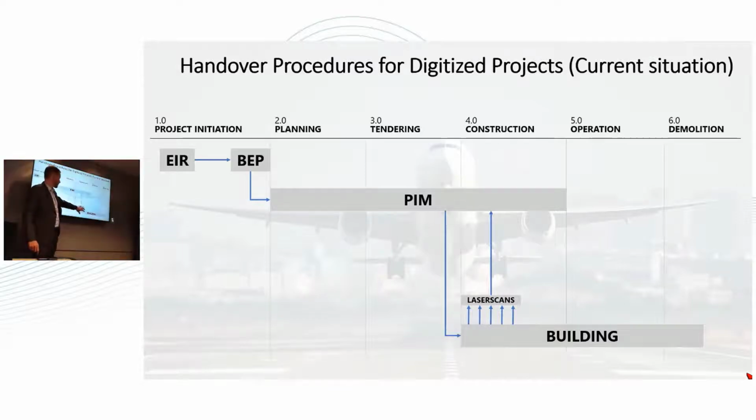So this is already done by now in all regular projects in our airport. All this information is usually handled by the general contractor for the project. If there is a split between the construction company and the designers, usually we keep all this BIM stuff in the hands of the designers, because then you have full responsibility from the beginning of the project up to the end. If you split here and hand over everything to the construction company, you have two handovers, and this makes everything worse.